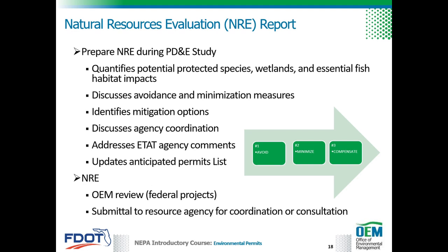See FDOT's NRE outline and guidance document for more information on how to prepare an NRE. This document is available on OEM's website. The NRE should be submitted to OEM for review for federal projects. NREs for state-funded projects are not required to be reviewed by OEM.